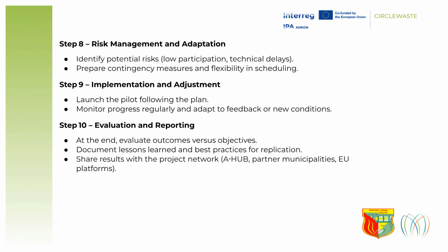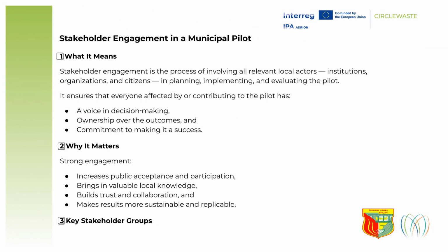Step 9 is implementation and adjustment. Launch the pilot, monitor progress, and adapt as needed. Finally, Step 10 covers evaluation and reporting, assessing outcomes, and sharing lessons learned. Stakeholder engagement is key. It means involving all local actors in planning, implementing, and evaluating the pilot. This gives stakeholders a voice, ownership, and commitment. Strong engagement increases participation, provides local knowledge, builds trust, and ensures sustainable results.